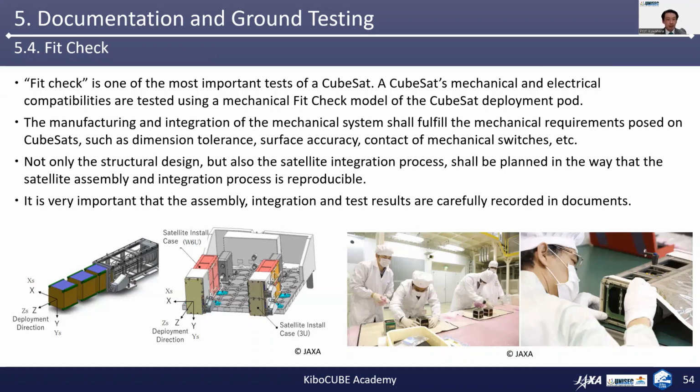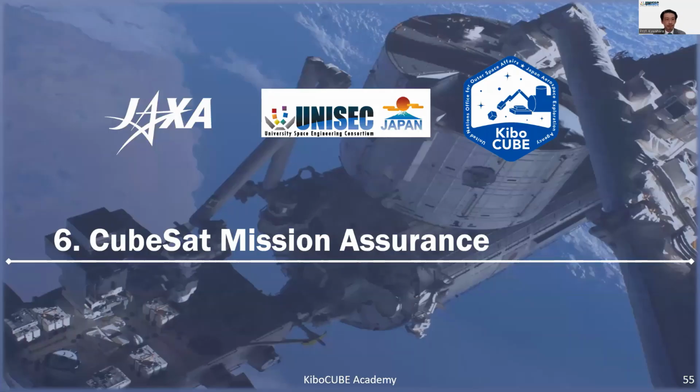So not only the structural design, but also the satellite integration process shall be planned in a way that satellite assembly and integration processes are reproducible. It is very important that the assembly, integration, and test results are carefully recorded in documents. These documents are also input information for the safety and design reviews. Finally, I'd like to talk about the mission assurance of the CubeSat in the next chapter.